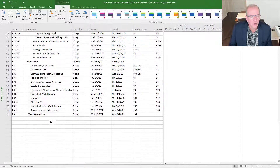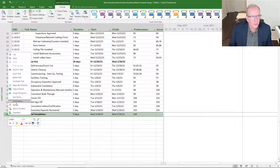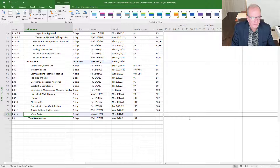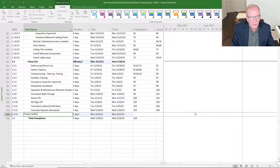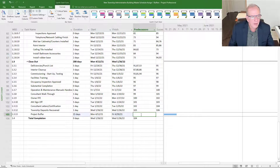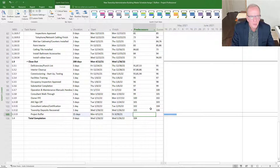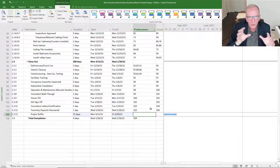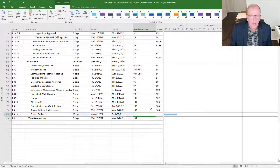At the end of the project you could also insert a project-level buffer. You insert another task, call it 'Project Buffer,' and maybe allocate 15 days. This would be extra time for the overall project — more for the unknown unknowns. This would be like a management contingency reserve buffer, overarching the individual line-item buffers. You could even have those buffers be inclusive of bad weather days that may come up during the project period.